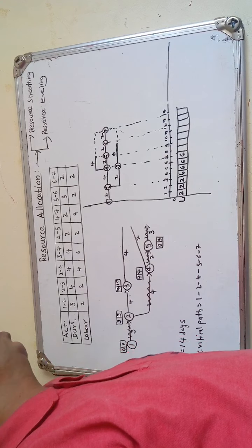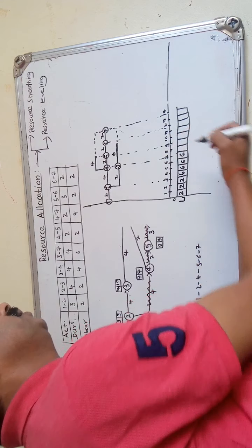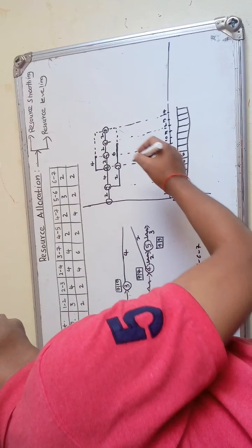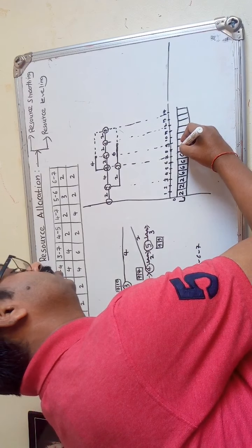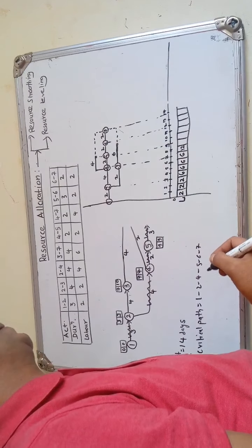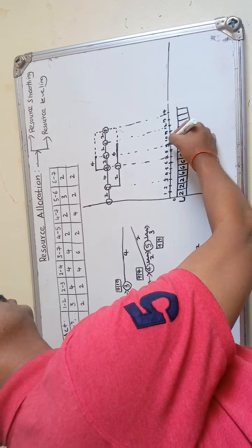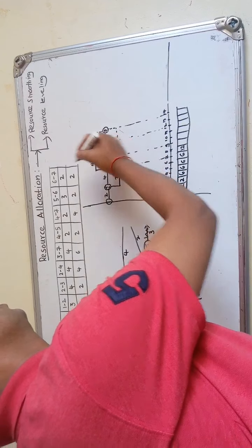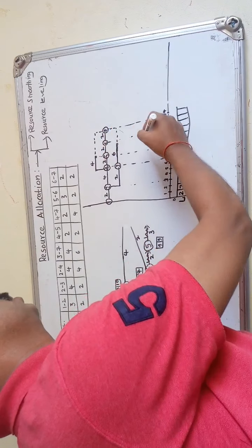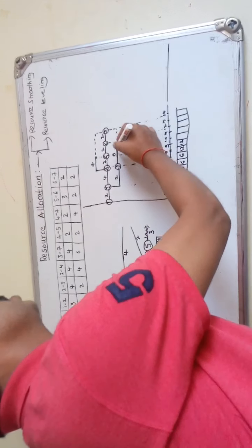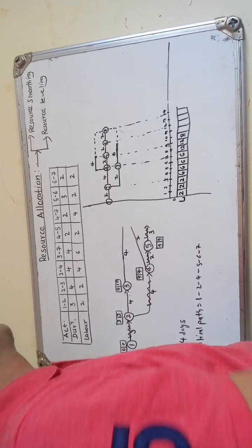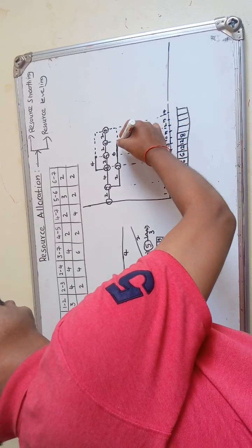Now go to the eighth day. What is the requirement? Go in the upward direction, it cuts 6 plus 2 plus 4. 6 plus 2, 8. 8 plus 4, that is 12. Then on the ninth day, that is 6 plus 2 plus 4, the same 12. Now on the 10th day, move in the direction, 6 plus this particular 2, that is 8. Now go in this direction, 11th day, 6 plus 2, that is 8.